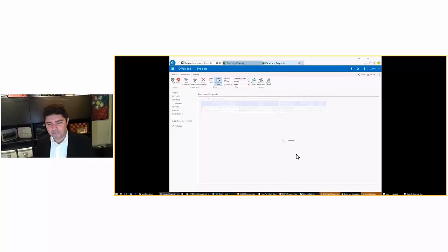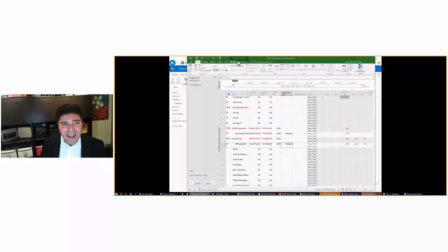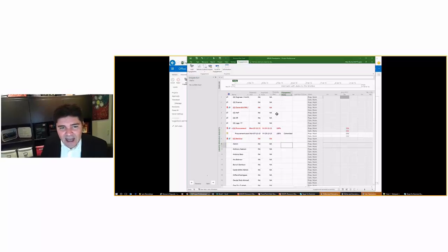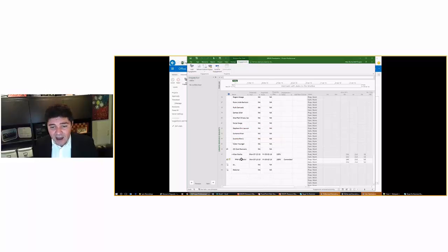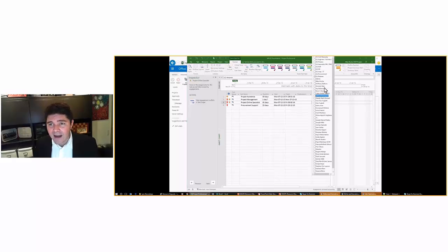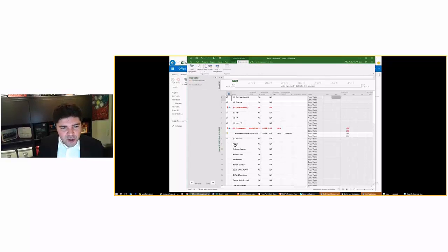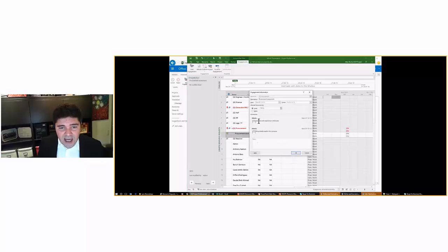Okay, so now what I'm going to do is go back to my project and refresh my engagements. What you can see is now I got committed work for procurement, and Allan is now also committed. That means I can go back and replace this by Allan, and I will keep my procurement guy here because it's not defined yet. If you want to check the comments from your managers, you can just double click and you can see here all the comments and all the history that you have requested.